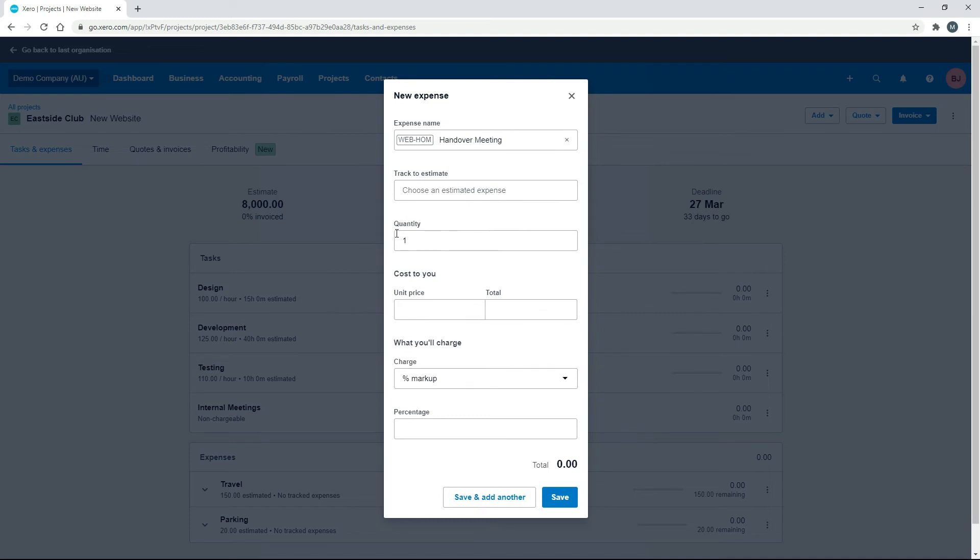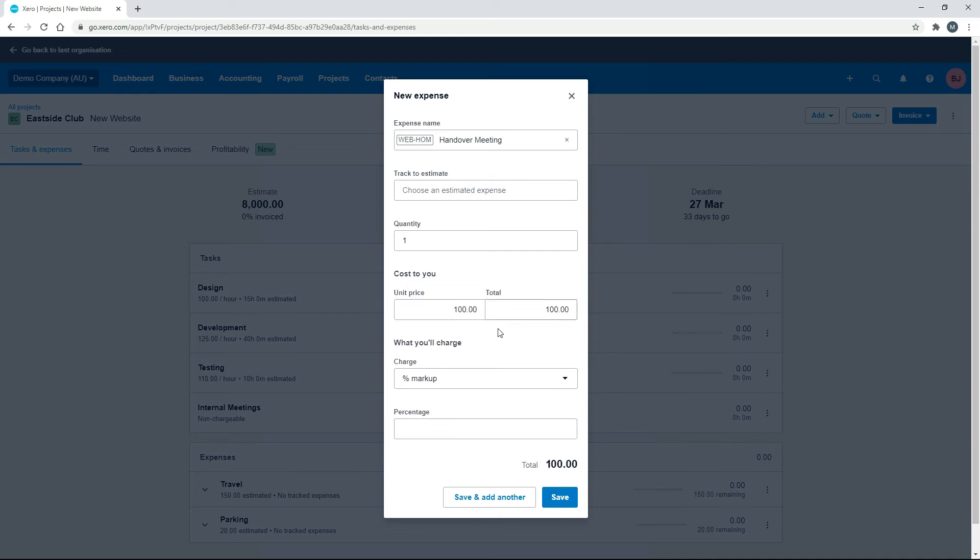Okay, we're not tracking it to an estimate because we didn't put in an estimated expense, but you can if you like. The quantity is one, and the cost to you, so this is not the amount that we're charging the client, this is a cost to us. So if you want to, you can put in a cost. So if this goes for two hours and it's $50 an hour for your staff rate, you can put in $100 there if you like. Or you can put in nothing if you don't want to track a cost against this meeting.